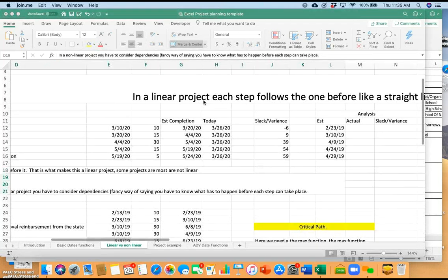And then actually be able to compare the original date, which was 2/23, to this, figure out a variance for that, and then at that point say, okay, what was the cause? Was it a vendor that gave me inaccurate information on how long a project would take? Was it a board that dawdled? Whatever it was, and then figure out to what extent we can control that.